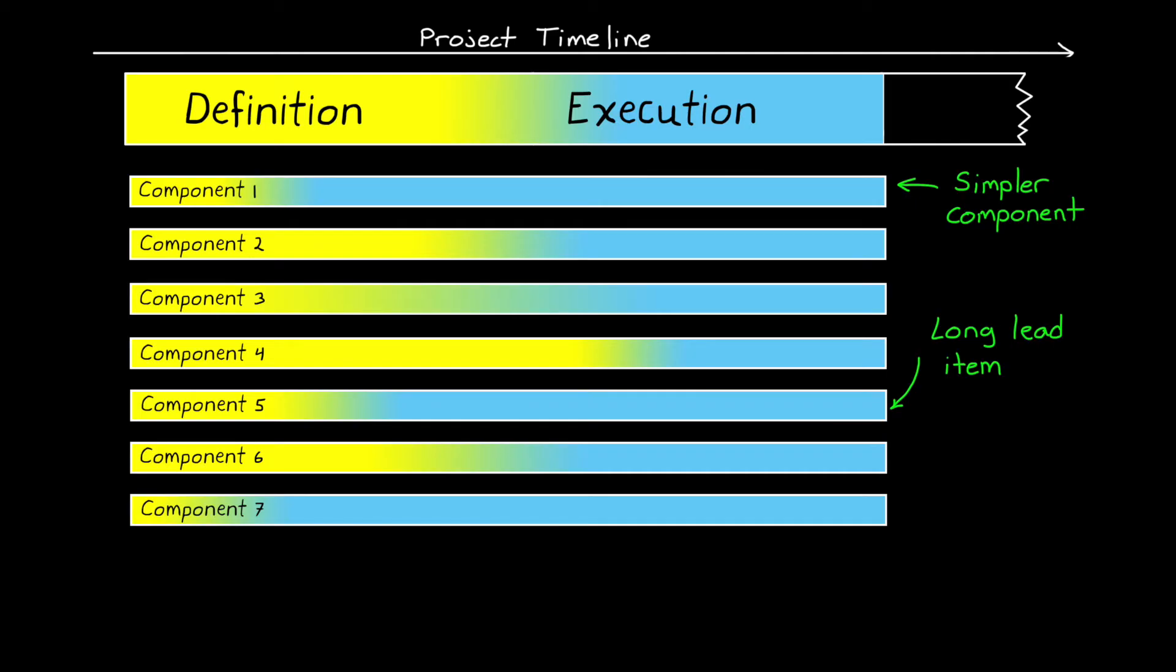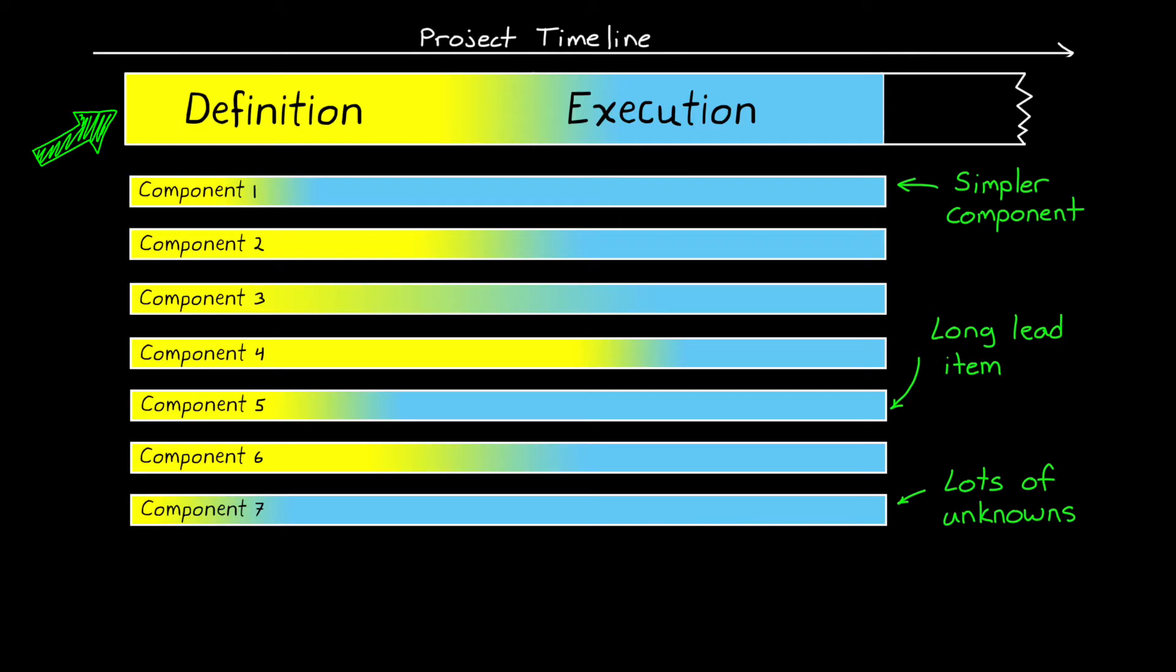Or it might be intentionally moved up in the schedule because of a known long lead in procuring some of the parts. Or a component has a lot of unknowns, and the feasibility of the entire project is in jeopardy if you don't focus on finding a solution for that component, so you have to start development earlier. But regardless of the reason, this simple gradient is really many different gradients that represent the transitions of each of the major components or sections of the system.